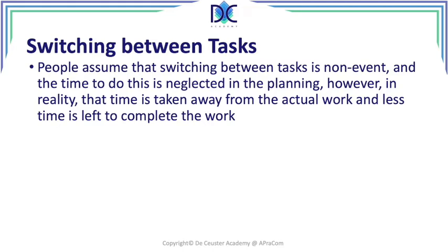Now, when you look at doing tasks in parallel, different teams working in parallel, we already included that doing things in parallel means that the activities have to be extended a little bit, because we lose efficiency due to the fact that certain work is done at the same time.